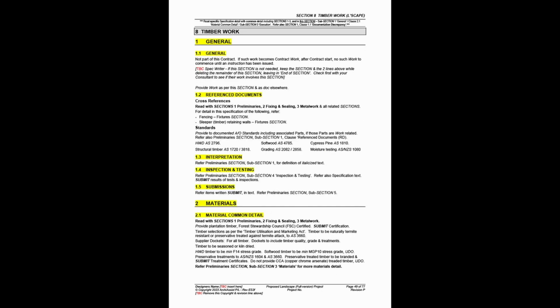Builder administrative items are submissions and notifications, identified by the words notify and submit, written italicized, bolded, all capped, so they stand out. Hold and witness points are not used. Instead, the superintendent is timely notified of a future inspection and has the choice to act on it.